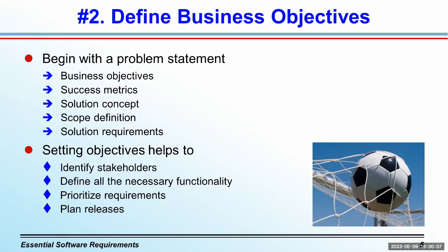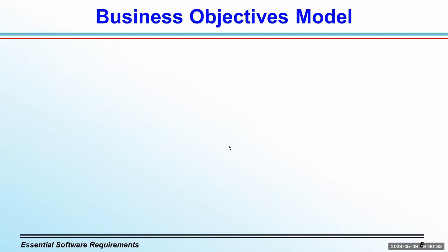So business objectives let you determine when the business problem is solved or the need is fulfilled or the opportunity is exploited. And if you don't define them, I'm not sure how you tell that. So while it's easier to state vague goals, I think it's a better idea to write your objectives to be specific, quantitative, and measurable. Otherwise, how do you tell if you've achieved them? I don't know. So here's a tool that might help.